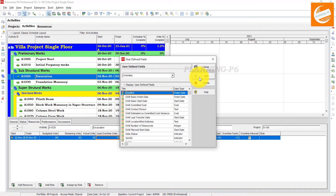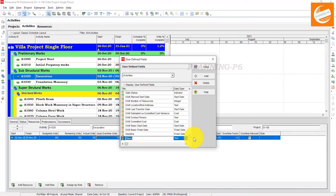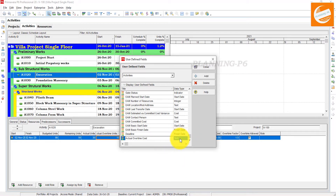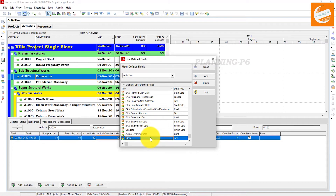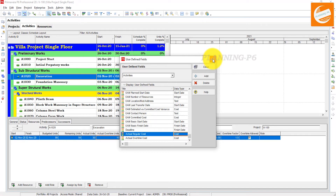We will add two new columns. The first one — name it 'Actual Overtime Cost' and set the data type to Cost. Add one more — name it 'Actual Regular Cost.' This regular cost is the cost specifically assigned to the activity without overtime. Close this dialog.